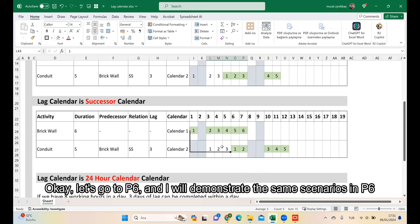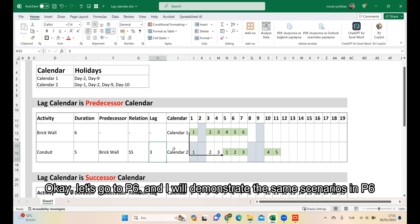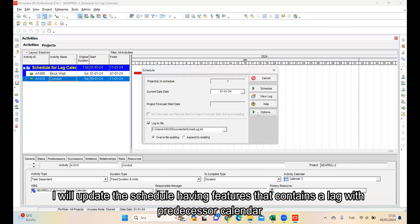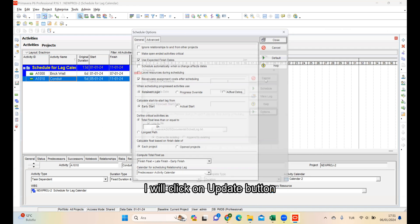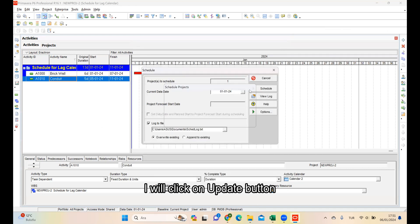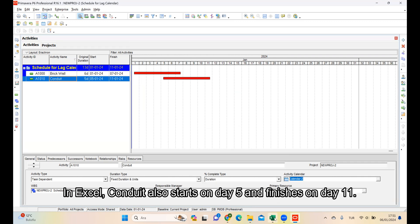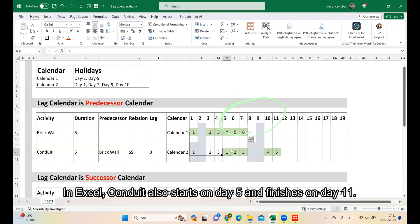Let's go to P6 and I will demonstrate the same scenarios in P6. I will update the schedule having features that contain the lag with Predecessor calendar. I will click on the Update button. Considering the lag calendar, the Conduit starts on day 5 and finishes on day 11. In Excel, Conduit also starts on day 5 and finishes on day 11.